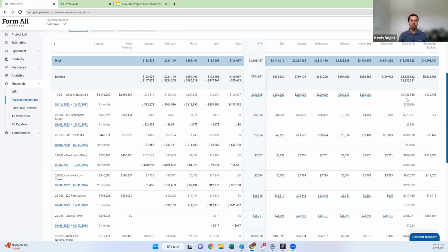And then it's going to show me what my 2023 total is, and then what my remaining backlog is going to be at the end of 2023. So it's going to take that contract amount minus the prior revenue, subtract all the revenue I'm doing in 2023, and I know how much is going to be remaining at the end of 2023 that I can then project out into 2024 or subsequent years.